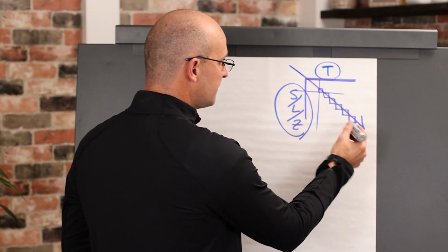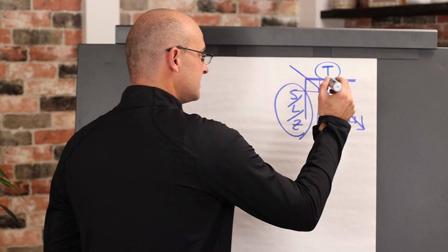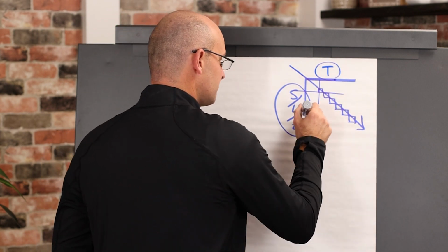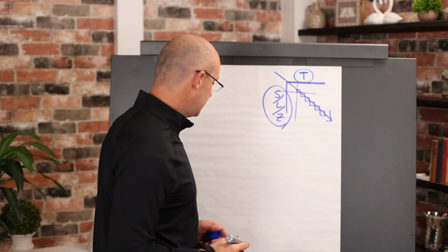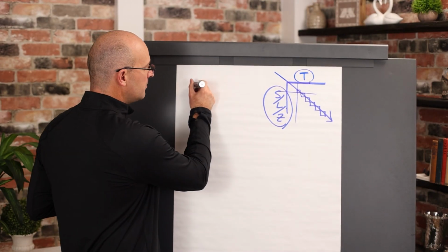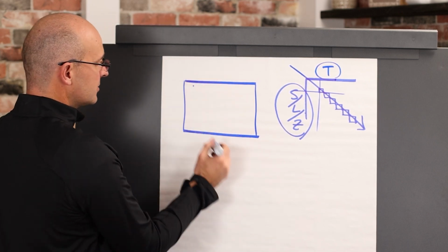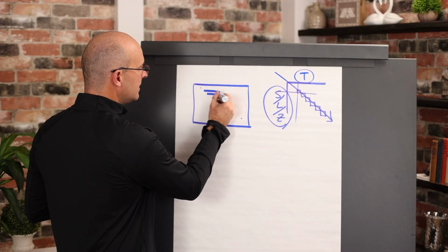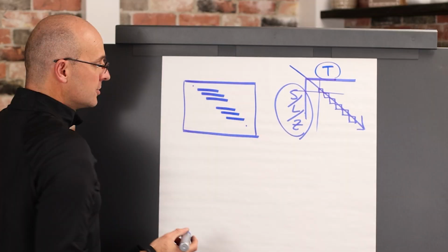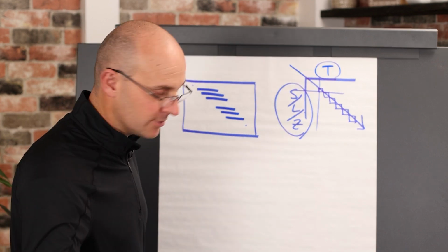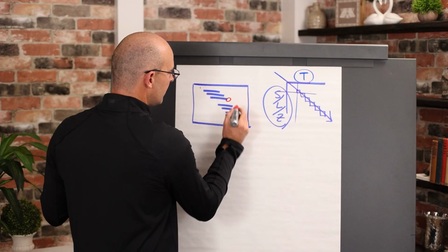So if the trades flow, we need to see that flow in the visualization of time and space. Ooh, did you get chills? I just got chills on that. So takt planning will show you on one page that environment, right? So you'll have your start date, probably your end date, and these takt phases will show rhythmic work. So when you look, oh, this is super exciting. So instead of a critical path, each of these phases have buffers at the end.